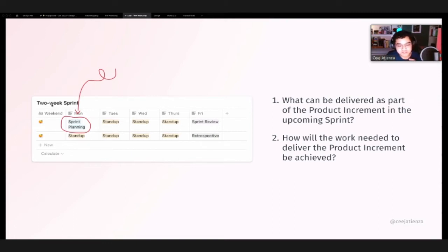So this is where you start planning that for this sprint, we have to target this specific goal. By this sprint, we want to finish the front end for the specific feature. By this sprint, we should have finished testing this feature with our users. By this sprint, we should have released this into staging or production. So you want to set an overall goal by the end of the sprint. Check your tickets or your stories or your tasks and make sure you put them into that sprint that you're going to be doing. I'll be showing more detailed versions of these later when I demo how a sprint board looks like.